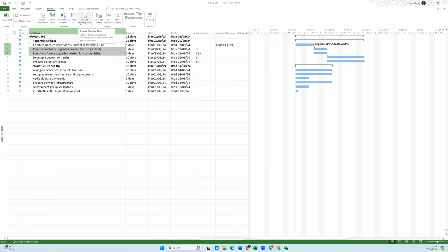Because the standard calendar, I'll show you the standard calendar for MS Project. The standard calendar for MS Project is weekday, which is Monday to Friday. But let's assume that you have guys that need to do weekend working. Okay, some of the activities, yes, the whole plan, the whole project team are working Monday to Friday, but you need another calendar for some activities of people.